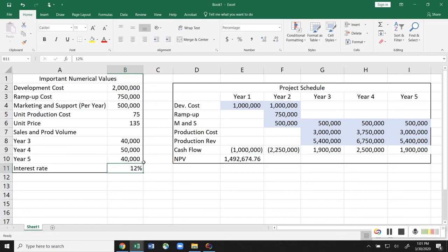And then the other thing is, it's even possible that you had a negative net present value and you would still do the project. Let's say you're a company that has to come out with a new model every year, like the iPhone. Apple has to come out with an iPhone every year, and they're probably making money on it. If you're a company like that, every year you've got to do the new model. Even with a negative net present value, you may still do the project because you're probably still making a profit on it, and you're doing it for the long-term sustainability of your company.